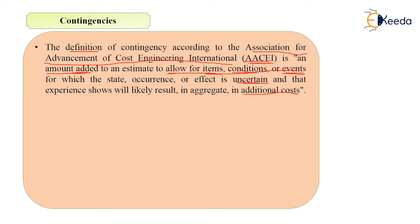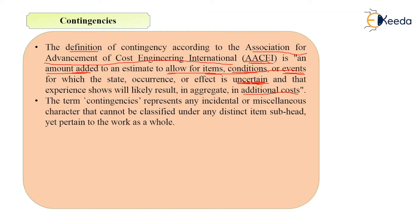A particular amount will be added into the estimate for something that may occur and is uncertain. This word 'uncertain' is important — we cannot say with certainty that this item will occur in the construction process. So it is an uncertain item. We have to add a particular amount into the estimate, and that is your contingency. We do not know at the time of estimation whether this item, condition, or event may occur.